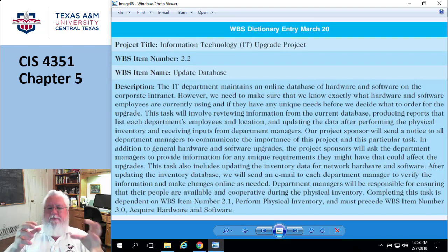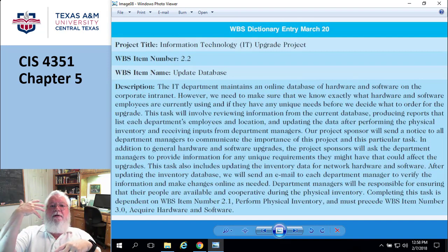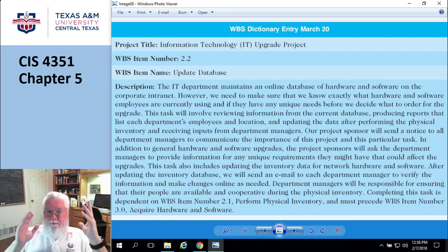By all means. Don't just document the ones that, okay, here's the ones we're going to do, and say nothing at all about the others. You have to say, here are the things we're going to do, and here are the things that we decided we are not going to do. It is not going to contain this. So both the things that are included and the things that are excluded. Okay. I'm telling you, I've done this before.